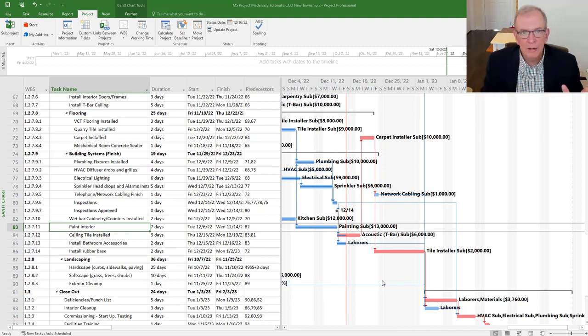You want to have a plan, you want to update, you want to revise, you want to recover, but you also want to see what's the impact of changes and contemplated changes. In the case of a contemplated change, that might change the way I price out the change order itself, because I've got to decide, is this going to impact my project, and the client still wants to finish on this date? And if they do, we're going to have to work overtime and weekends to be successful. You want to know this stuff, and it's not always self-evident when you're in the midst of a project. So it's a really good tool for doing that.